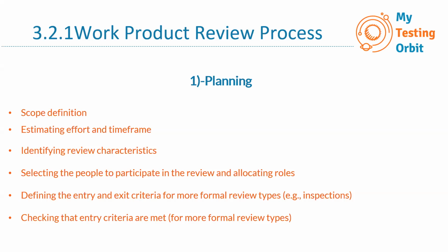The same is for exit criteria, that we mention what would be the criteria where we can exit from the testing activity. Like we can say that there are no high or critical bugs in the system, and the test coverage is complete, or maybe all the high risk tests are executed.